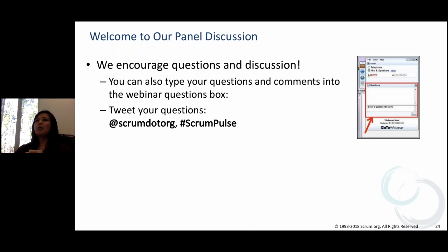I would highly advise that if you are multiple teams working together, you try to get on the same cadence. If you cannot, one of the suggestions, and this may or may not work, is getting on at least the same common cadence. So if you're running 4-week sprints, then another team, if they want to run a shorter sprint, can go to 2-week sprints. But it could never be, let's say, 2 and 3, because you would never meet. And then you would just have to figure out if that makes sense for you.